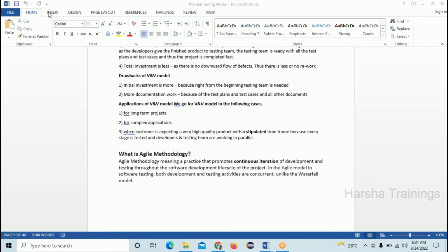In the first 15 days, we are going to develop the restaurants, multi-restaurants, e-commerce frames, login page, location, and delivery boy details. We develop these things in the first 15 days, so there is no need to wait until the entire project is completed over 3 months, right? Every 15 days, whatever work you have done, you put live. By that, the client can see the project progress, what is going on in their project. Are you getting what I'm going to tell? Yes.